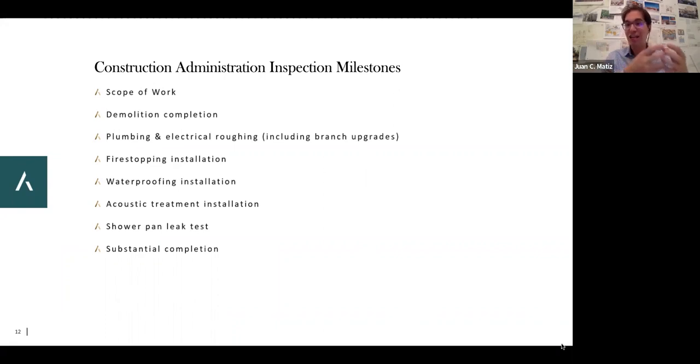But there's an exception when the inspection is requested. If the plumbing inspector does not show up by a certain amount of time, the master plumber that was mentioned earlier by Chris can self-certify, basically saying, I'm responsible for the plumbing, I don't need the city to look at it, let's close the walls up. That's okay, and it happens all the time. But of course, if the city does show up, they will look at it. The electrical inspection happens at the very end of the project, and it's one of the more minor ones. It has to be done well, but we do trust the licensed craftspeople who work in the city. The licensed electrician should be a competent professional, licensed by the state, and able to do their work.